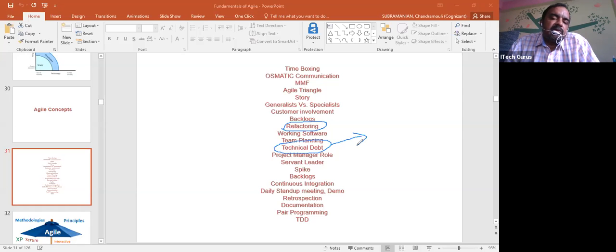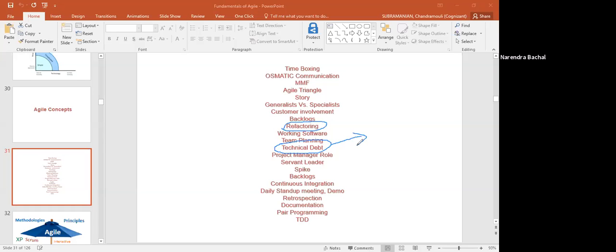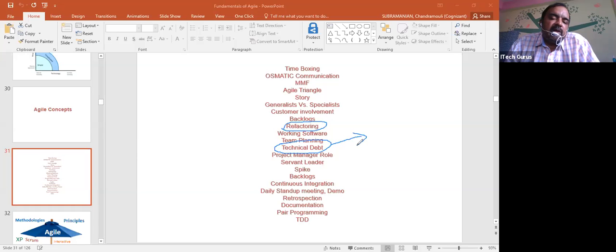Could you please repeat? The size of the technical debt, the size of the errors, right? Errors also can be estimated for how much time they will take. For example, in our case, I think we derived some 300 hours, right? And 300 plus 300 is 600 hours. If you have known errors in the product which go beyond 600 hours, then you need to stop adding any functionality. You need to come and clear out the technical debt, then move forward.